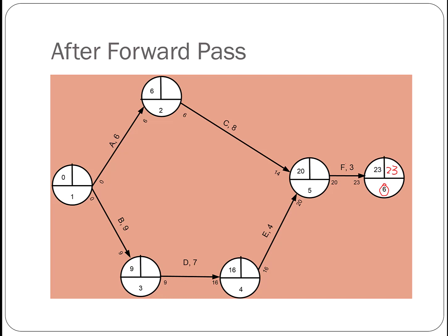So if we look at this activity, F's latest finish time is 23, because that's what this event here indicates.